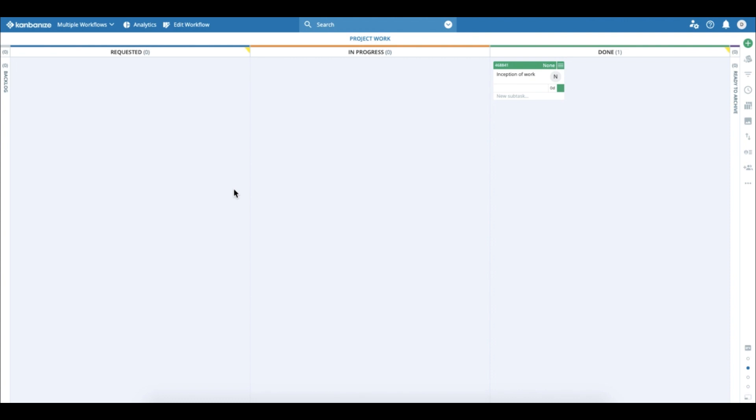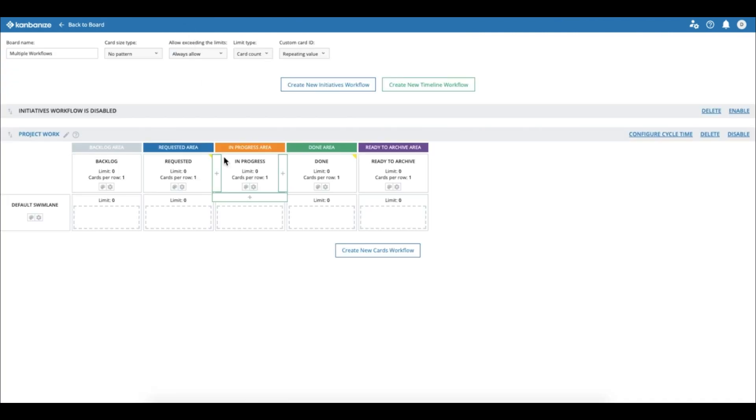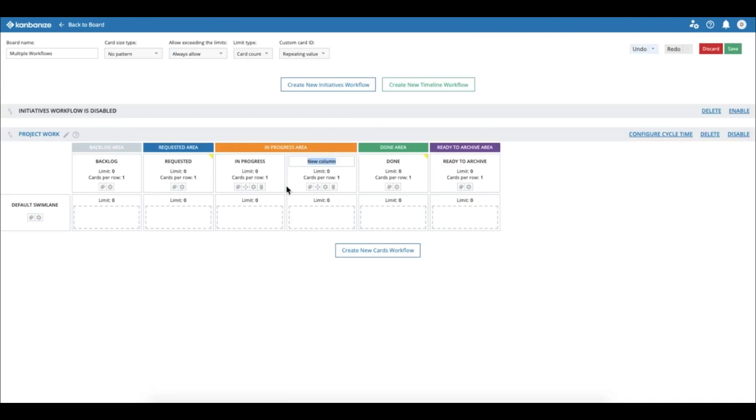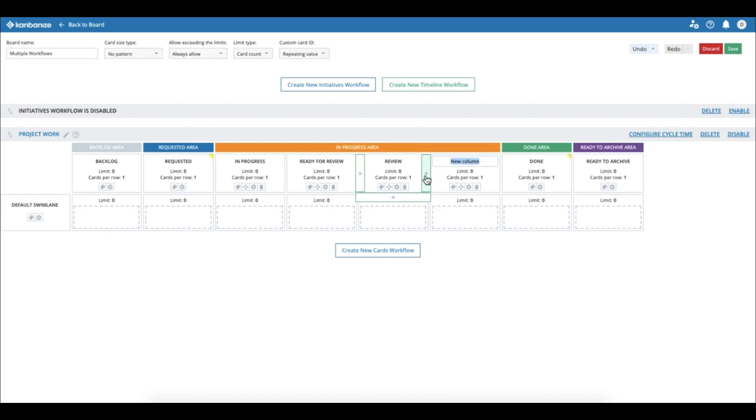But in order to do something real, let's add a few more columns. Let's add a second column. We can label it 'ready for review' to signal that the work in this column is ready to be pulled to the next phase. And of course, the next phase is review itself. If we add one more, we can easily label it 'quality' because that's what we care about, right?